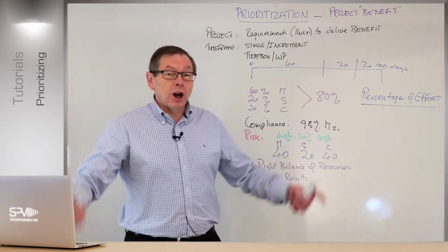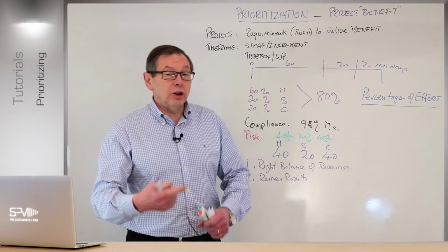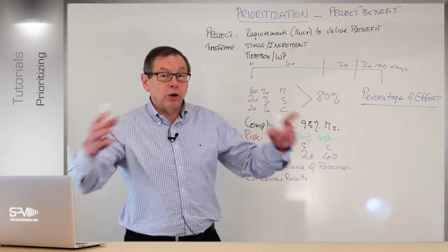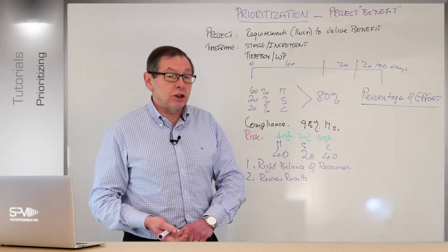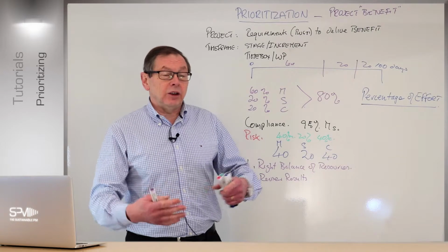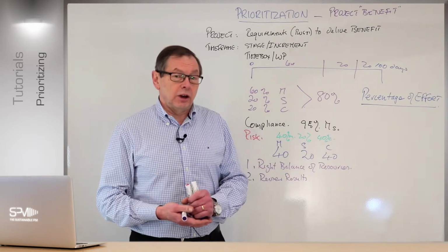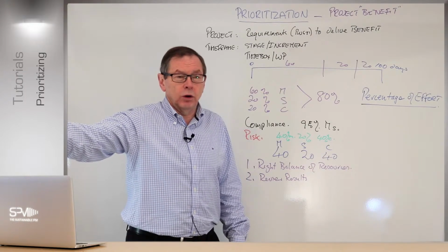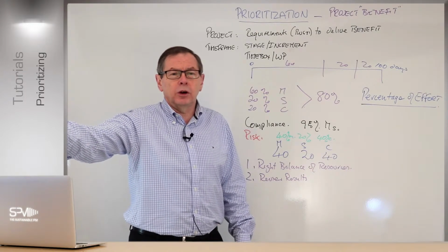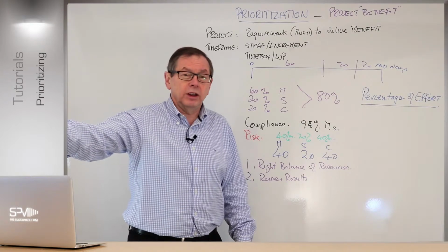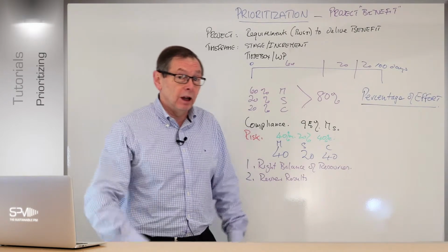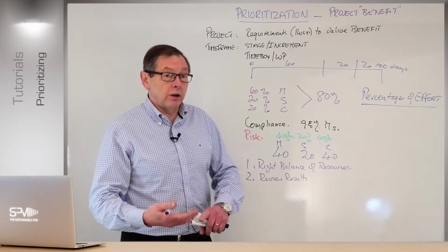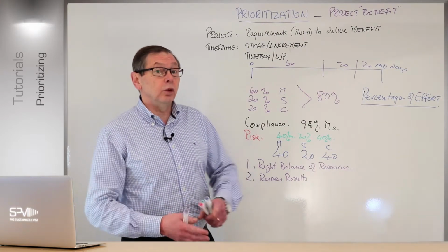Now, often people will come with a whole pile of requirements, and as you see in product-based planning, one of the benefits of using that particular approach is it bolts those requirements, or products really initially, into a dependency and how they're linked with each other. Because somebody coming with a list of them doesn't give you any indication what they're linked with. Well, why do you need that? What's it relevant to the project? What's dependent on it? Or what is it dependent on? Right? So you need to work that out quite quickly. And that's why that particular technique is a great way of doing it. Okay, it links them all together.